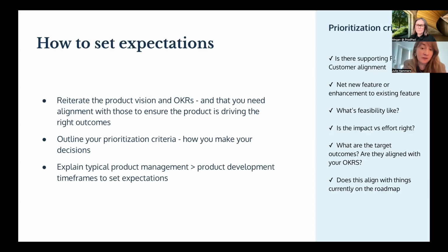We love our quick wins quadrant in ProdPad, the things that are potentially high impact and less effort, but not everything is a quick win, right? And some things will need to get broken down or broken out into different experiments or phases. And it's really important that you communicate that, hey, this type of project or this type of idea will realistically take us a quarter, or realistically, this is a quick win, but we've got a lot of high priority stuff on right now. And so once we pick up that work, it'll be done in a week, but it's going to come after these things that we already have laid out.